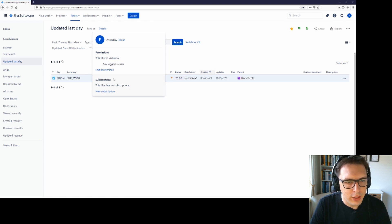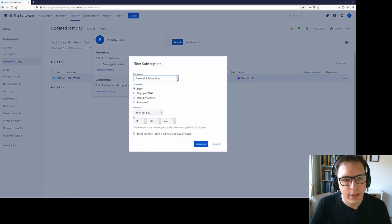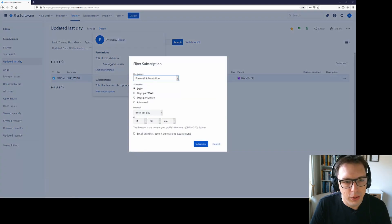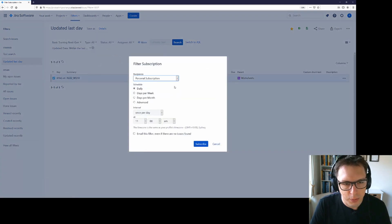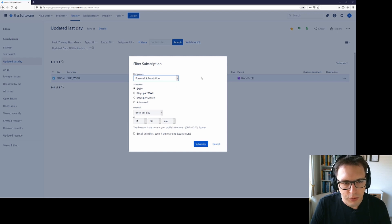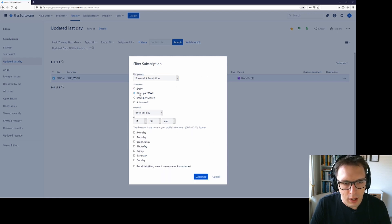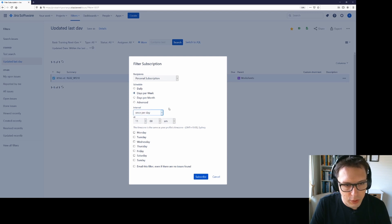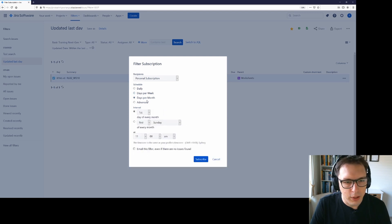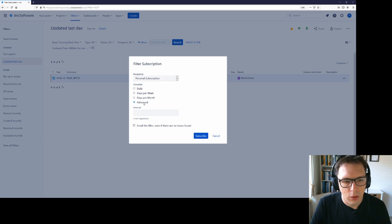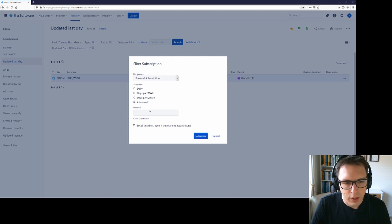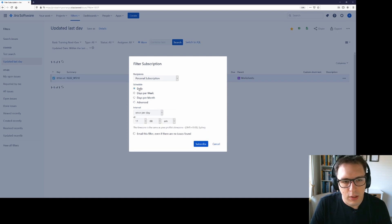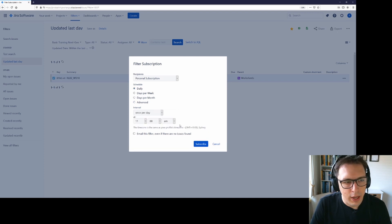The other cool thing that I get is subscriptions. If I click on subscription, I can select either a personal subscription or I can send it to particular user groups. I will leave it on personal subscription for now and I can have it email me either daily or on certain days of the week at a particular time or in particular intervals or on particular days of the month or in some more advanced interval.